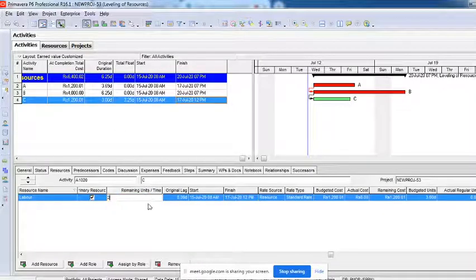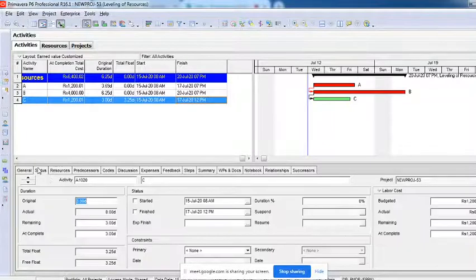You can see here, duration is decreasing. I am increasing the resources per day. If I use 3 labors per day, then this activity can be finished in 1 day itself. Vice versa, if I use only 1, it will take 3 days. Right? Why? The work is constant here, because we have made it fixed units in this case.